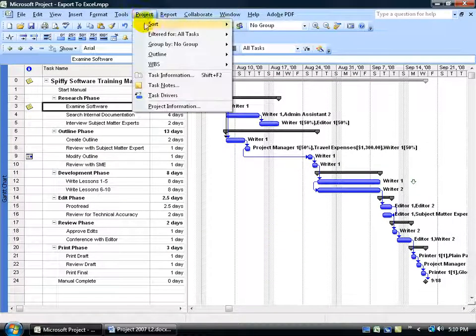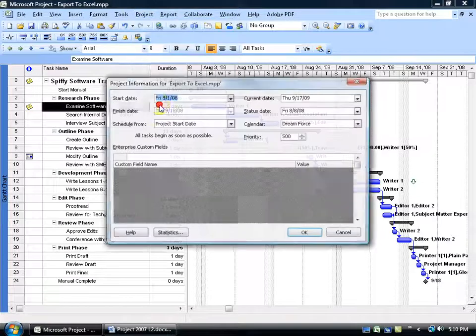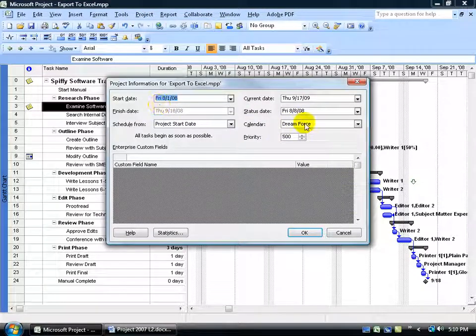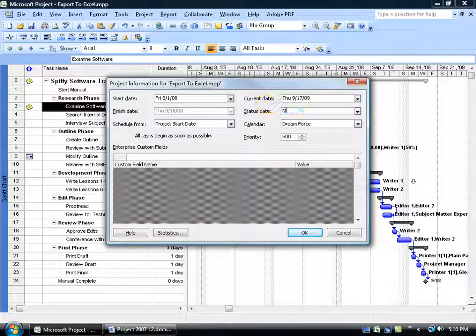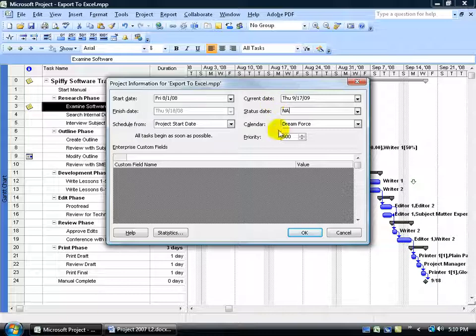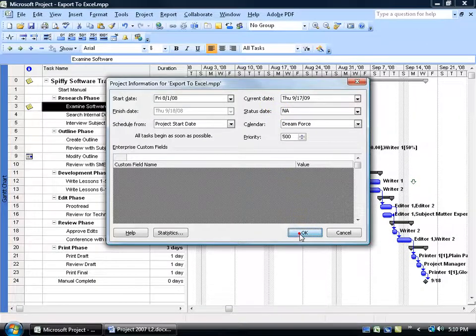And then back to the Project menu, to Project Information, to get rid of the status date, go ahead and type in NA for not applicable. That's what you've got to do to be able to have that revert back to the current date as your default status date, and then click OK.